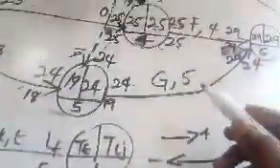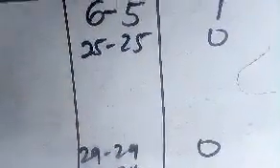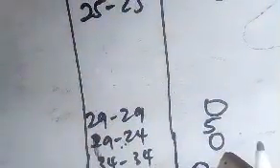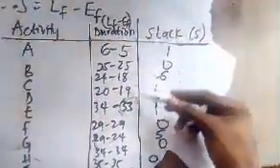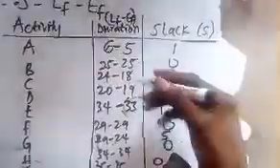So my G, going back to the question, if you check my G, you see we have G as well: 29 minus 24, LF minus EF. I have it as 5. And I have my E, LF, EF. On completing that, as we can all see, I've completed it like that. So you can see here where my greatest float occurs.